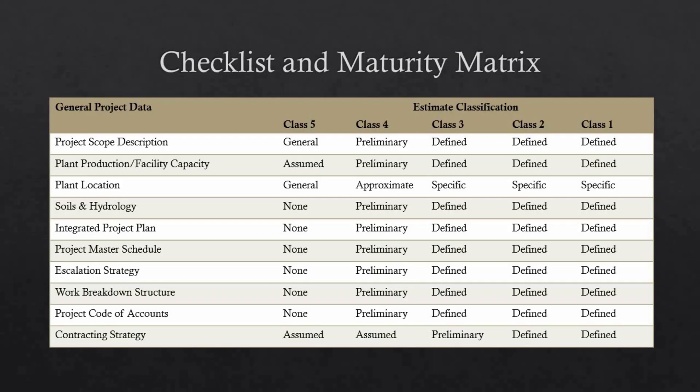The table illustrates how project maturity and data completeness evolve across AACE's five estimate classes. Data maturity grows significantly as we move from Class 5 to Class 1. Starting with Class 5, the conceptual phase, almost everything is assumed or general. In Class 3, the budget phase, critical items like scope, location, and schedules become defined — this is where projects typically secure funding. The biggest leap happens between Class 4 and Class 3, when preliminary data becomes firm. Contracting strategy gets fully defined in Class 2, since you can't finalize contracts until design is mature. Class 3 is the sweet spot for funding, while Class 1 is for dispute resolution or final bid.